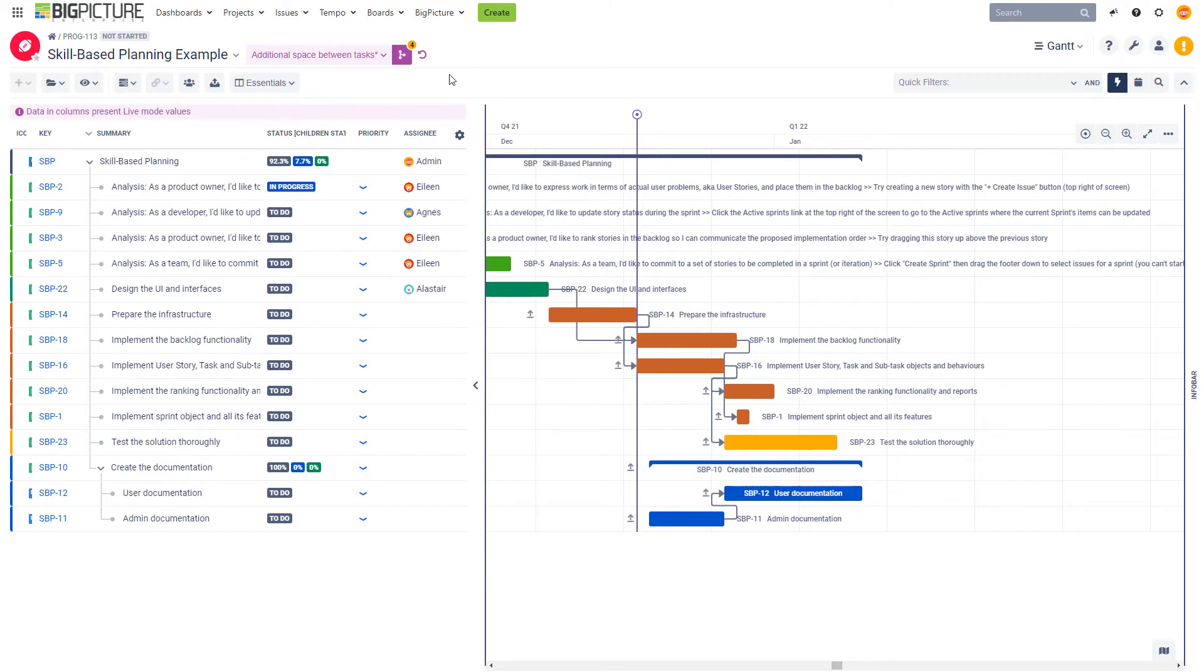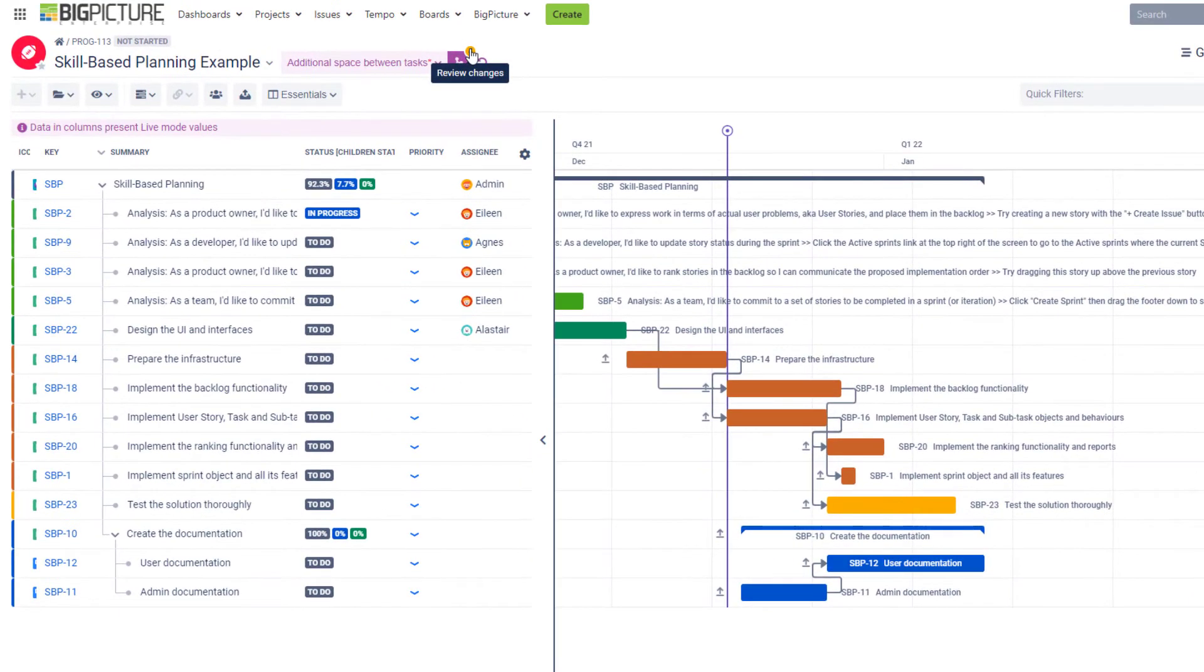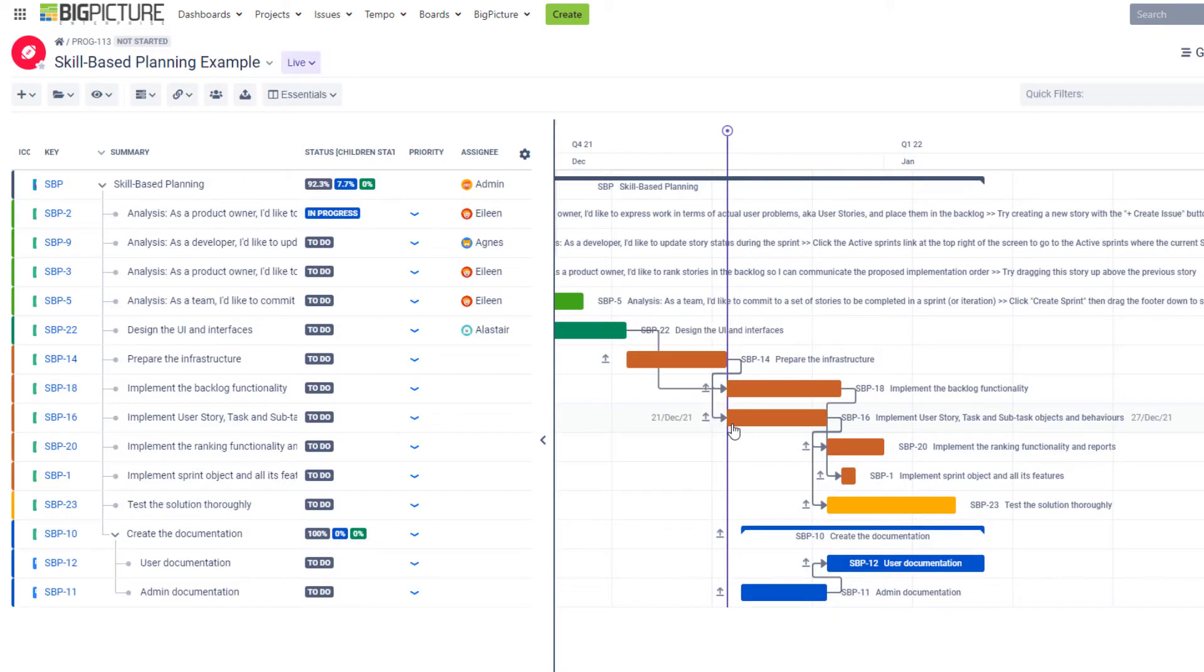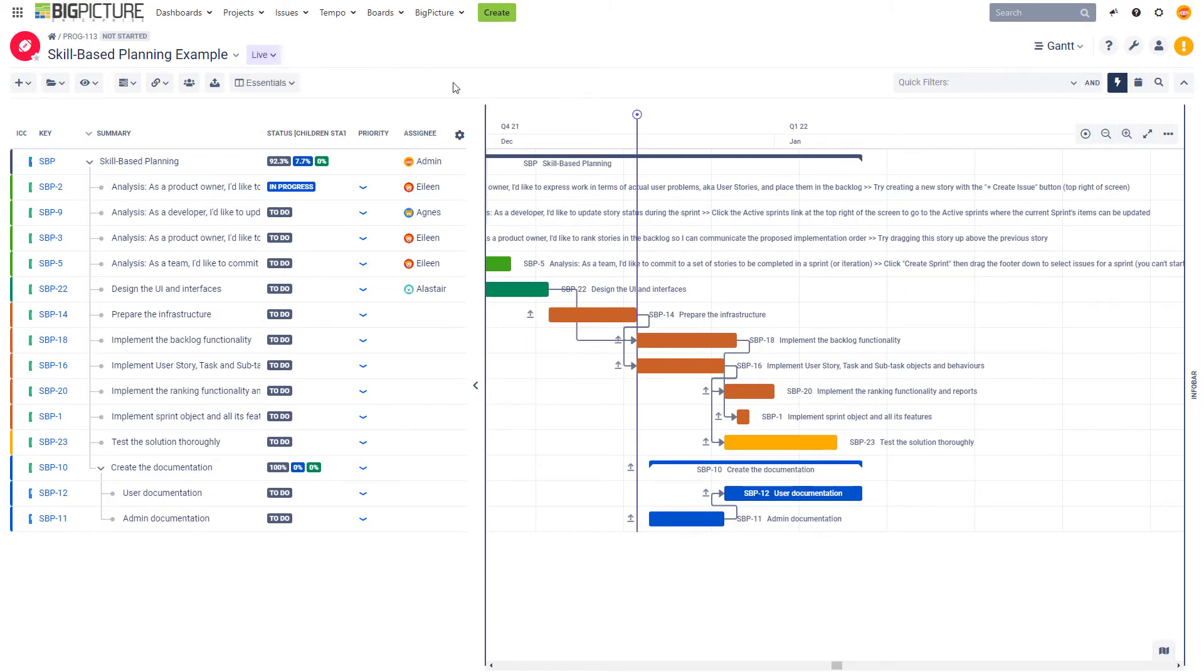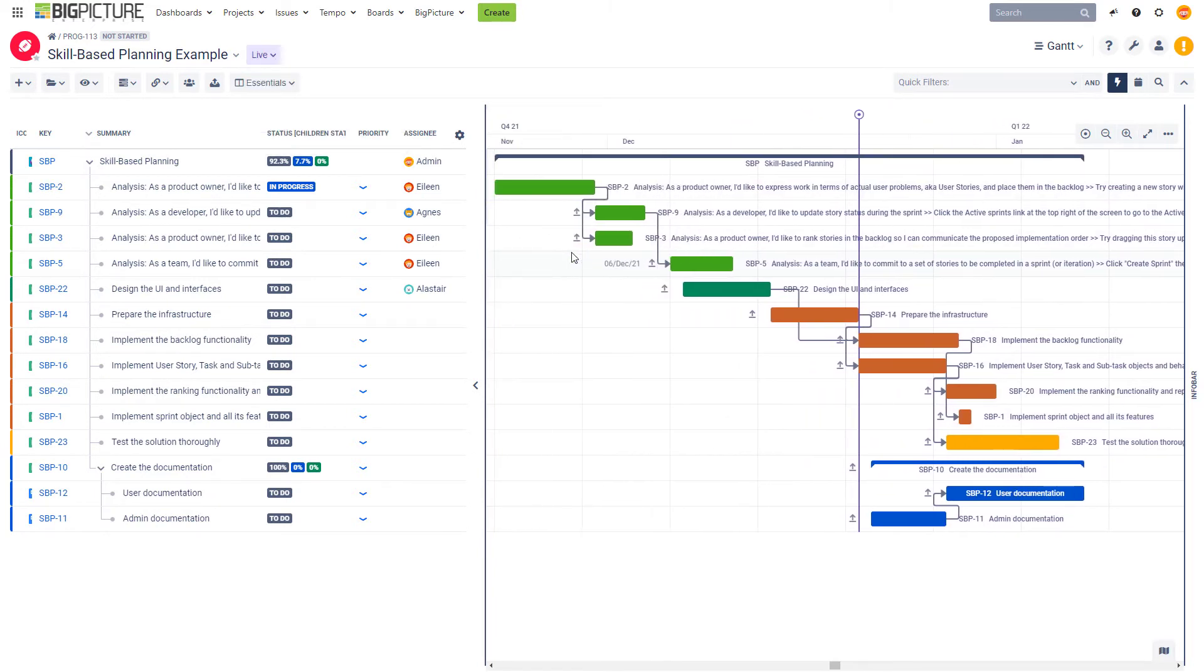So if you're happy after a while with all the changes that have been done, you can actually click here or here to merge the changes to the live scenario. If I do this, it will ask me for the final confirmation, and then if I click merge, all the information is going to be synced with my live scenario. Now I'm getting switched back to my live scenario, and it should look exactly like the alternative scenario that I've been playing with.